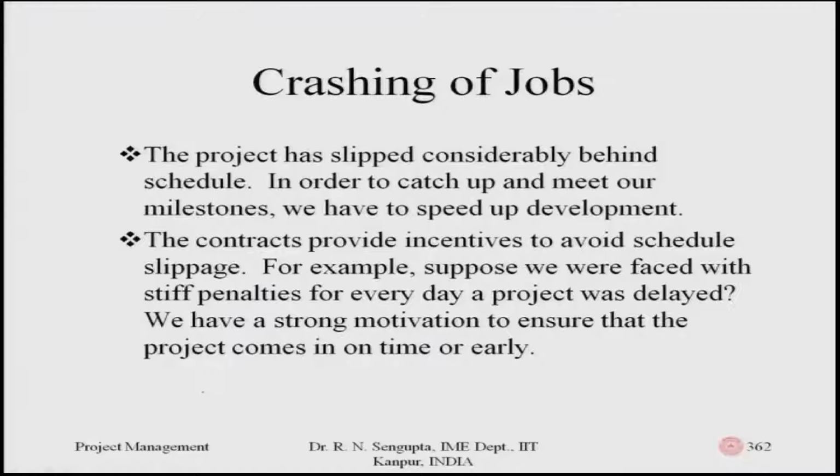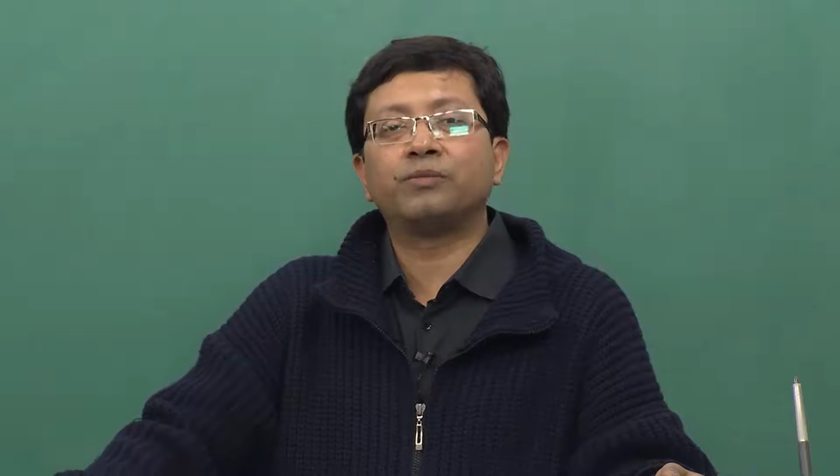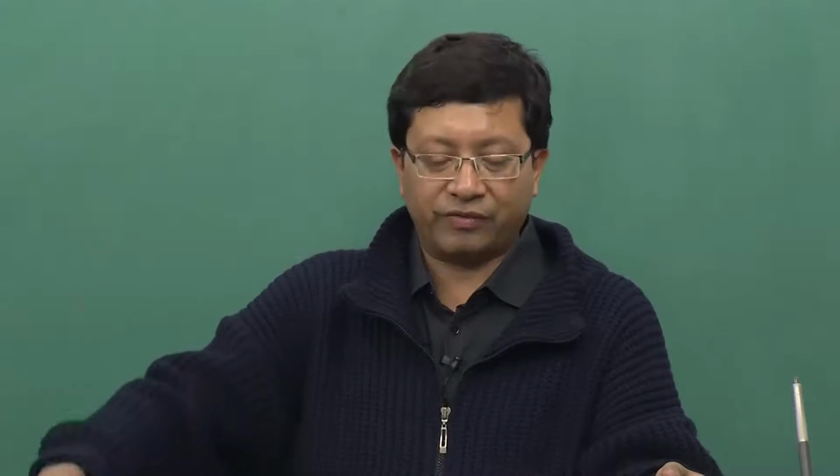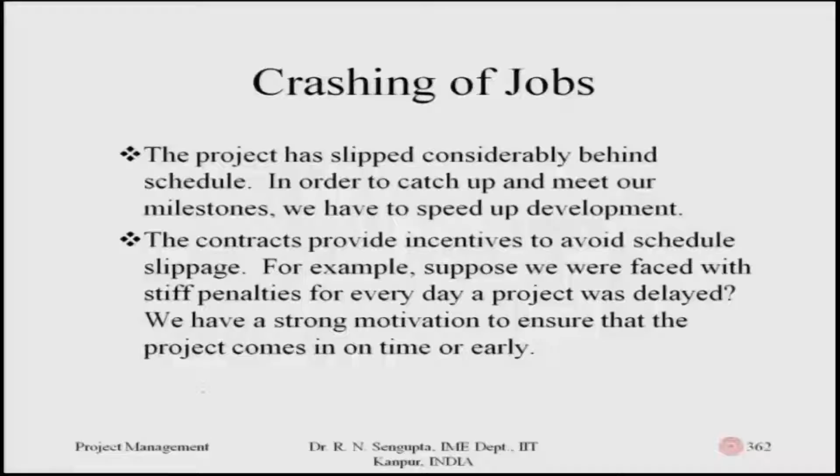So, in order to catch up, meet our milestone and the deadlines, we have to speed up the work of the project. The contracts provide, there may be such cases. So, I am just reading out some of the actual reasons why you may be interested to crash the project or the set of activities. The fourth point is the contracts provide incentive to avoid scheduling slippage. For example, suppose we were faced with stiff penalties for every day the project is delayed.